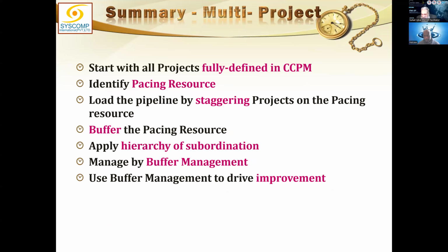It is not just one project we are talking about. Our resource, when it gets free from project A, may be required by project B. So that level of critical chain can only be exercised through resource buffering at multi-project level.